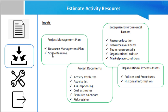The scope baseline identifies the project and product scope necessary to meet the project objectives. The scope drives the needs for both team and physical resources. Then project documents, which includes activity attributes — activity attributes provide the primary data source for use in estimating team and physical resources required for each activity on the activity list.